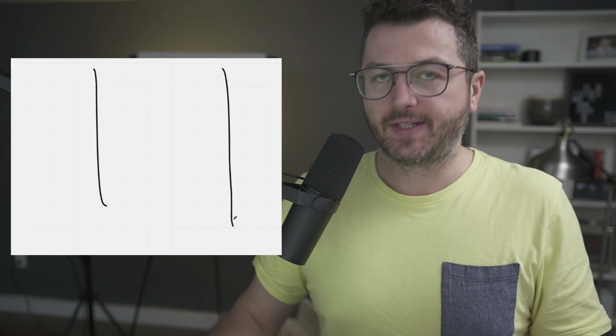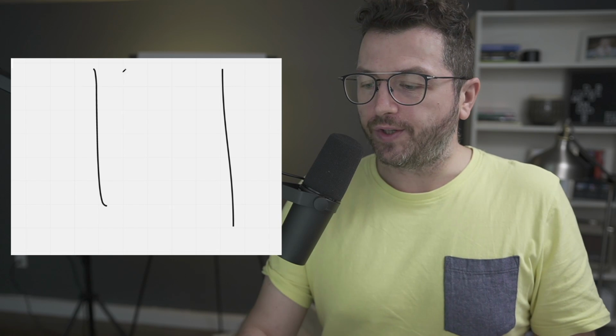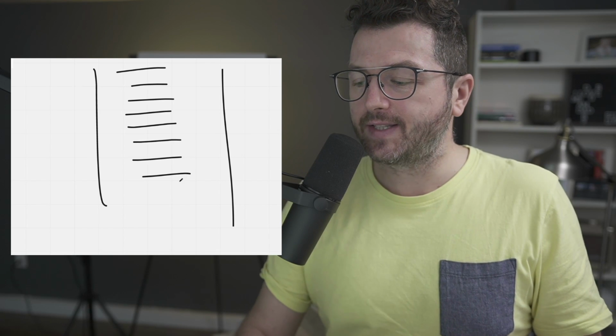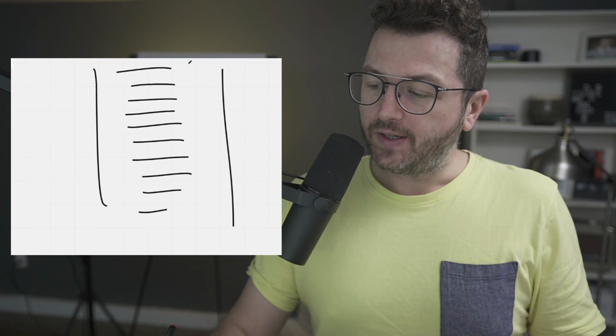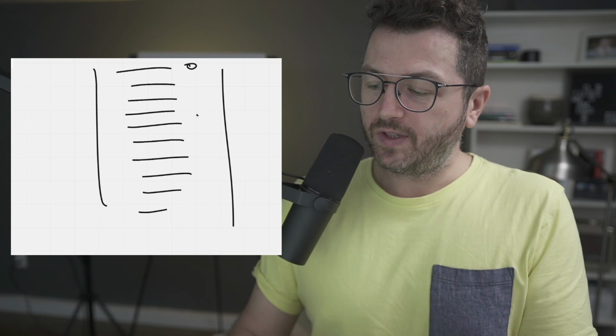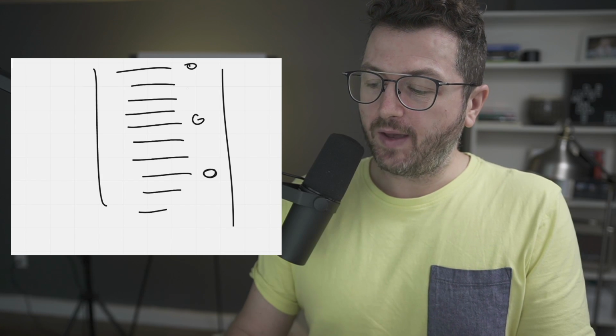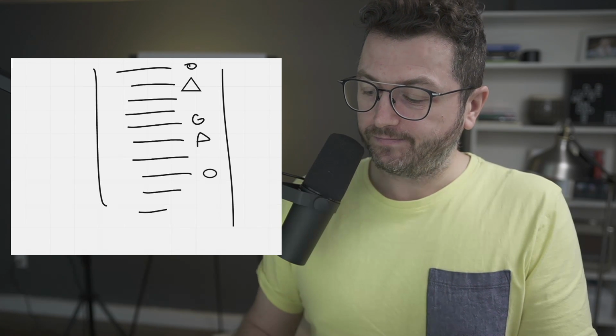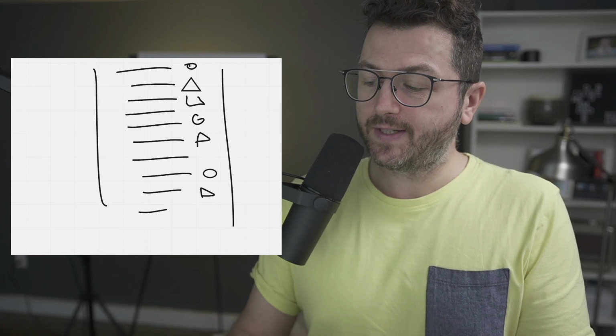So what I've seen and what I would suggest the most is to always have a master list, which is always ordered. These are the tasks that need to be done. Now, indeed, some of them are development. Some of them are marketing. Some of them are design.